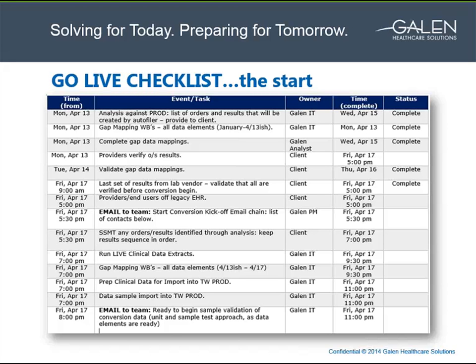One thing that isn't really on here that you often see with any kind of conversions or upgrades is a database backup. That's really a client decision as to whether or not they feel there's enough risk to merit a database backup. In the example that we have here, the client decided that, unlike an upgrade where you're changing the actual application and features within, with the conversion you're just pulling over patient-specific data, and they felt that the time invested into the database backup wasn't time well spent, and so they opted not to do that. But yet again, another example of something that can be talked about and worked out with the client.